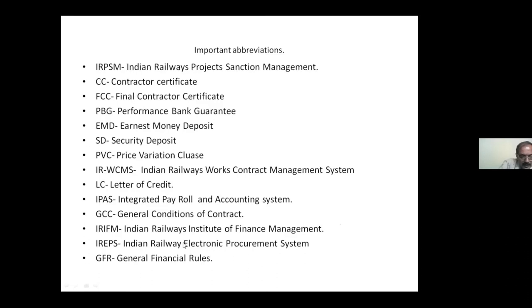2017. In this, whatever rules are framed by the Ministry of Finance for different items like land items, like security items, all these things, they are applicable to all the central government organizations. For example, the Railway Board has issued one circular regarding the performance guarantee that it should be collected only 3% up to 31/12/2023. Now, those instructions are given based on rule number 161 of GFR 2017.